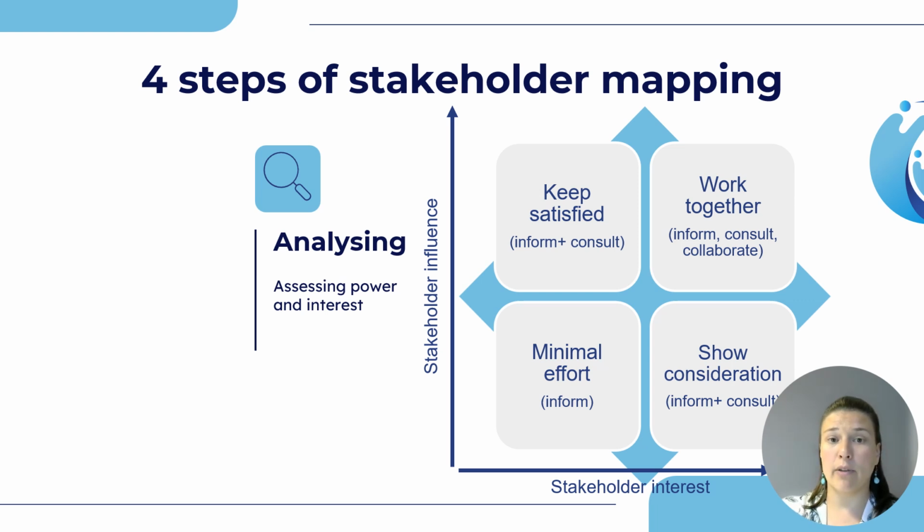Stakeholders with low influence but high interest need to be kept informed. They may offer valuable input but have limited power for decision making. And lastly, stakeholders with low influence and interest require minimal effort, yet should remain observed. This matrix helps to determine the type of collaboration and communication with the respective stakeholders.